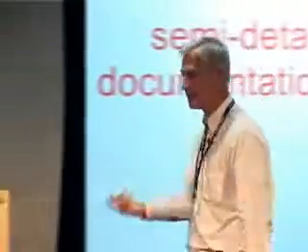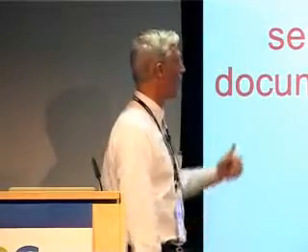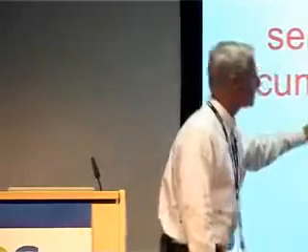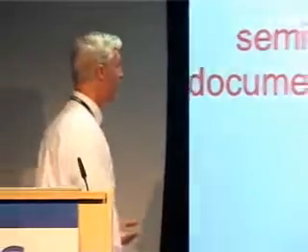Instead, what you need to sometimes do, unfortunately, is semi-detailed onshore documentation each sprint. And you might need to start off that way, and I encourage you to try to reduce this over time so that the offshore team can take on more of the detailed analysis responsibility as they learn more about the domain. And specification by example is a great way to do that.